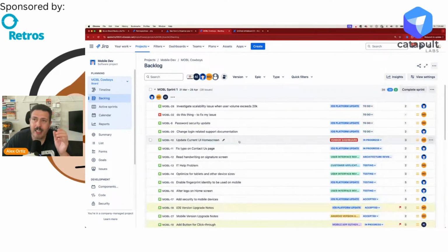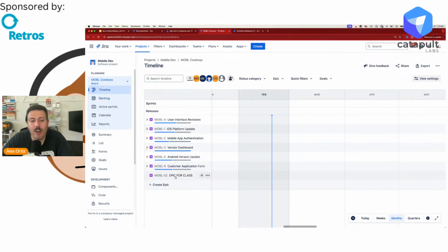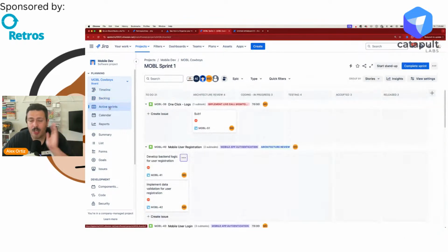And that's by design. And so the only place where you really truly see the epic, really truly see it, is in the timeline. So the timeline up here, you see our epic here for the very first time, epic for class. Now, this is not the only place where you see the epic. You actually do get to see the epic in the backlog and the active sprint. I'm going to show you those in a minute.